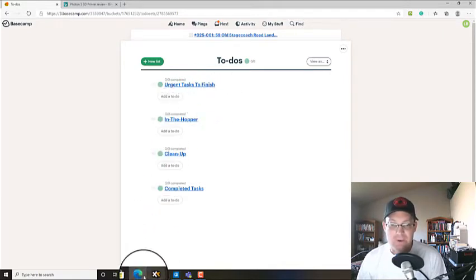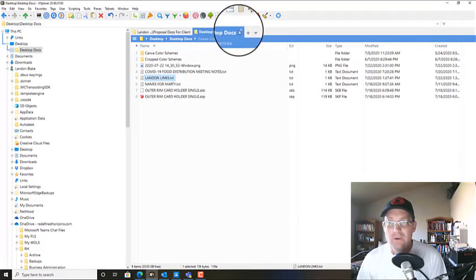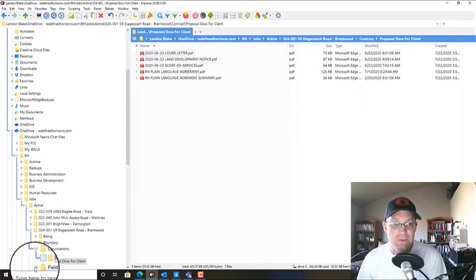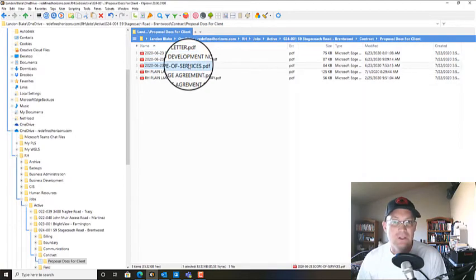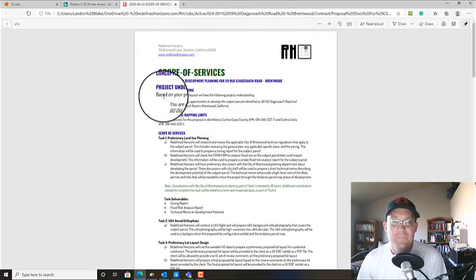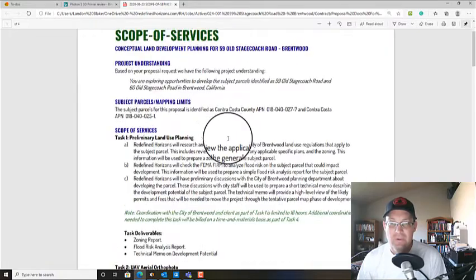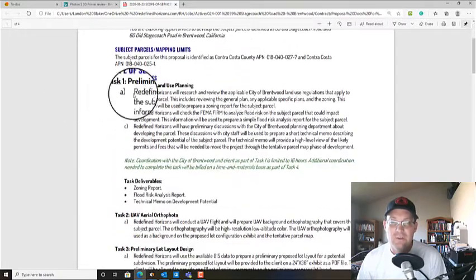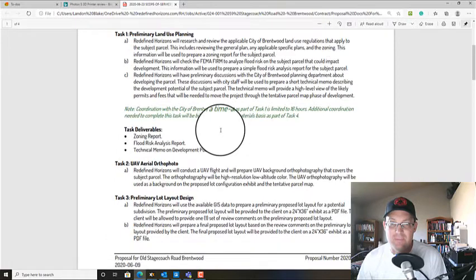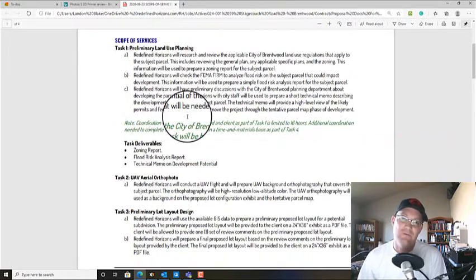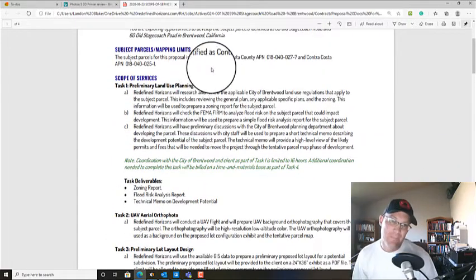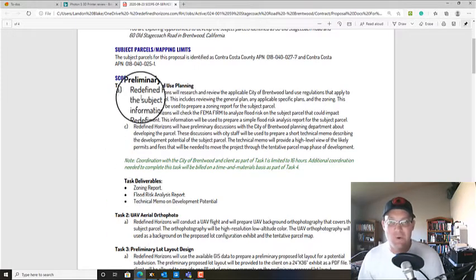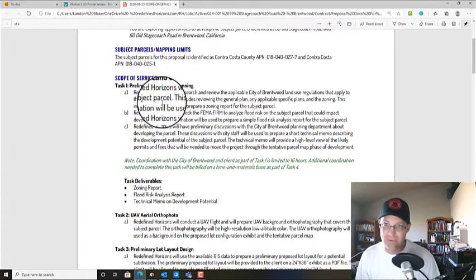So let's go ahead and pull up our scope. If I go in here to my project folder under my contract admin, we can open up our scope. So what we want to do is go through each task in the scope and make sure that we're adding the appropriate tasks. We don't want to forget anything that's in this scope. So this process of mapping the scope of services to the task in Basecamp is actually really important.